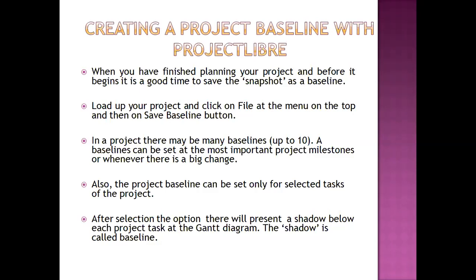In a project, there may be many baselines, up to 10. A baseline can be set at the most important project milestones or whenever there is a big change. Also, a project baseline can be set only for selected tasks of the project. After selection, the option will present a shadow below each project task in the Gantt diagram, and this shadow is called the baseline. So now we will implement these steps one by one in the Project Libre tool. So let's start.